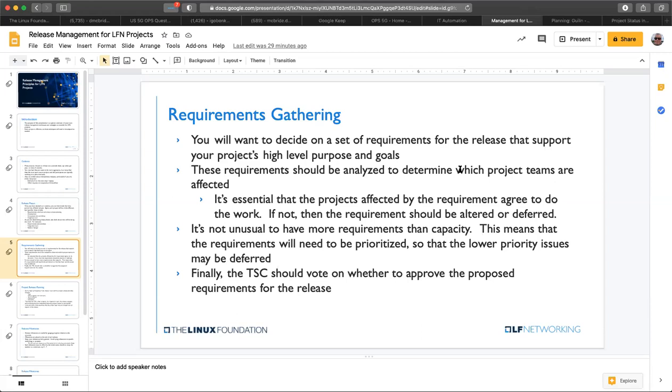So what I tell people is allow your individual sub-projects to work in an Agile manner if that's what they want to do. And then what I'm describing here is an umbrella process that encompasses that work underneath. So I don't see a discrepancy between having this process at a high level while individual sub-projects, working on individual repositories, can work in an Agile fashion. I agree with that.